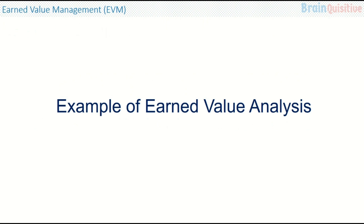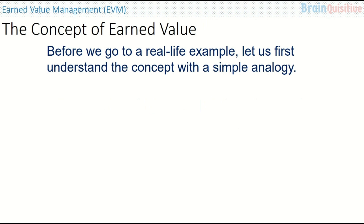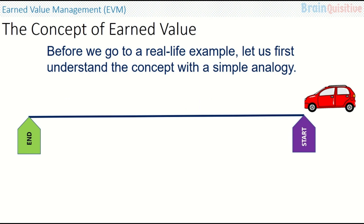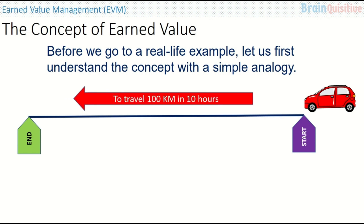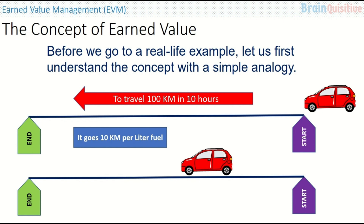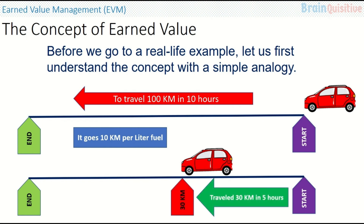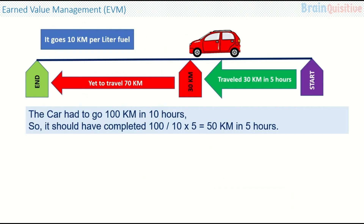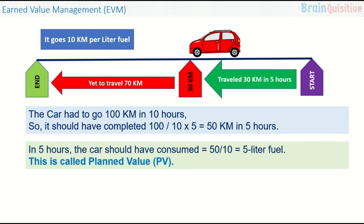Now let us see an example of earned value analysis using a simple analogy. We have a car that needs to travel 100 km in 10 hours, and the mileage of the car is 10 km per litre. After the car travels for 5 hours, we see that it has travelled only 30 km and has yet to travel 70 km. The car should have completed 100 divided by 10, multiplied by 5 — that is 50 km — in 5 hours.